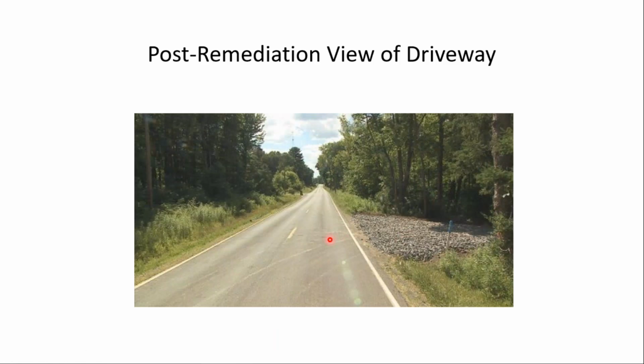This is the access road, but this is after a subsequent remedial measure. Remember, we talked about that on day one. After the crash, the company involved with the gas well placed crushed stone here at the throat of the access road. And actually the driveway permit required that this should have been present after the road was constructed, but it was not. And so after the crash, the stone was put down, and that's why I call it a subsequent remedial measure.